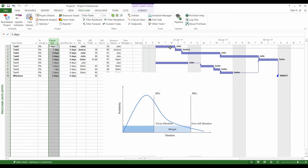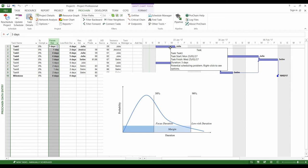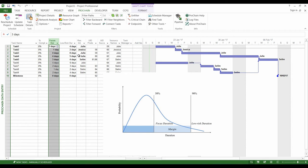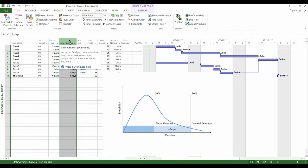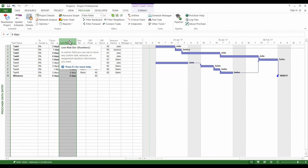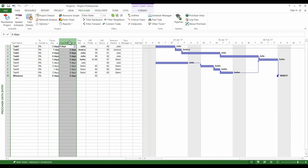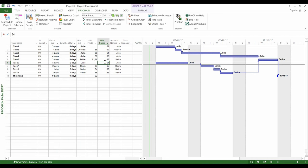The second duration you have to estimate is the low risk duration. You have 90% of chance to respect such a duration. It is equal to the focus duration plus a margin. It will be shorter or longer according to the variability of the task. This duration is the one that people usually estimate for their tasks in traditional schedules, and this estimate is often two or more times the focus duration because people want to be sure to respect their commitments.